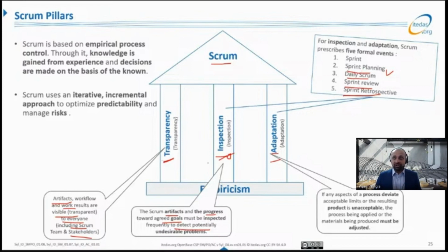And each of these pillars is dependent on each other. So basically you need transparency to allow inspection. If people are hiding artifacts, for example the product backlog, sprint backlog, or the product goal and sprint goal, and they are not available for inspection, or they are not transparent, then they can't be inspected, right? And if you don't allow inspection, you don't know what is not going right, what is having a problem. And if you don't know that, then you can't implement adaptation, because you are going to implement adaptation